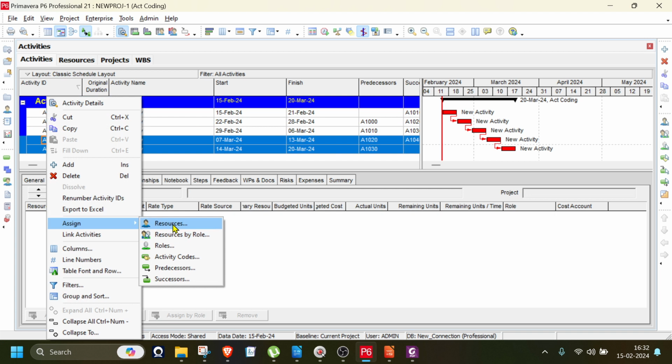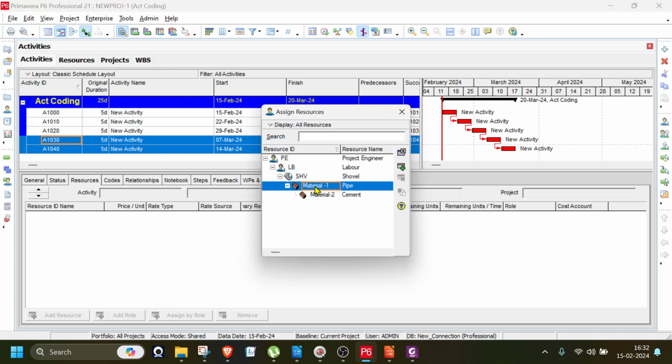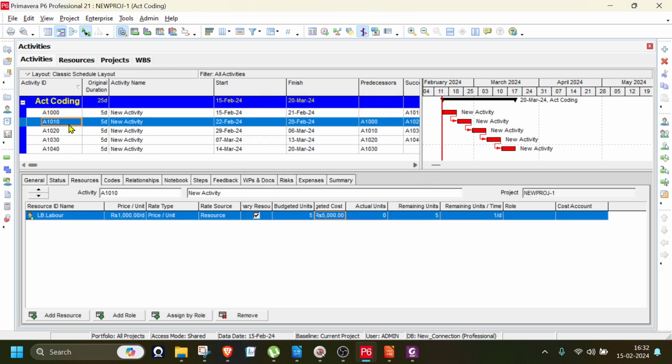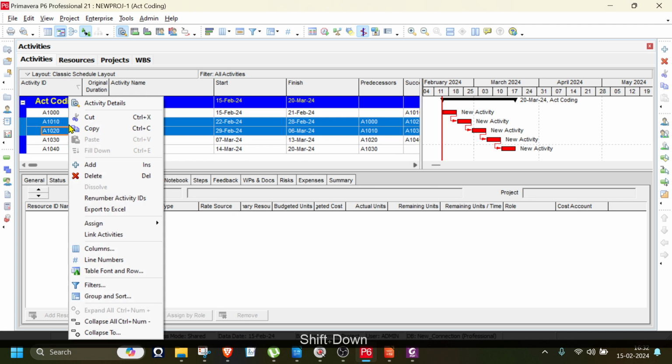There is no multiplication for budgeted units. For materials, you only add what is required. Only for the labor and non-labor part, you multiply the number of labors by the number of days. That's it. And here we require only what is required.